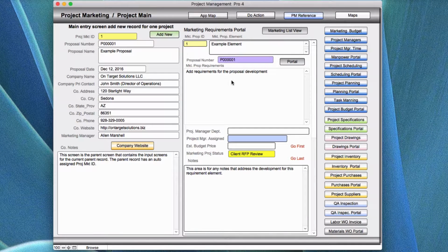You would take the actual RFP request, or the RFQ, request for quote, and you would go through it and break down individually each particular requirement, and also note anything that might cost money or something that is a deliverable that has to be identified.